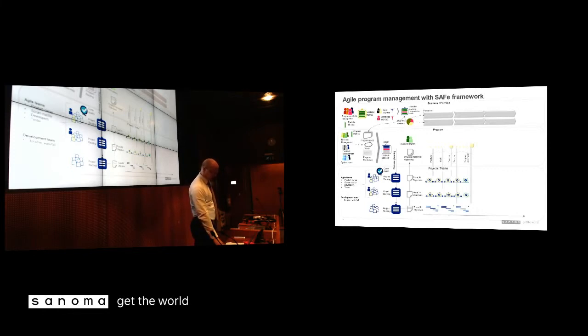And another really important thing is that, as known with development, we will develop in cadence. We might have, for example, a 2-week cadence in development, but we will release on demand. And this is probably hardly understood from the business side, that we need to consider when we are actually going to release and what the actions for deployment are.